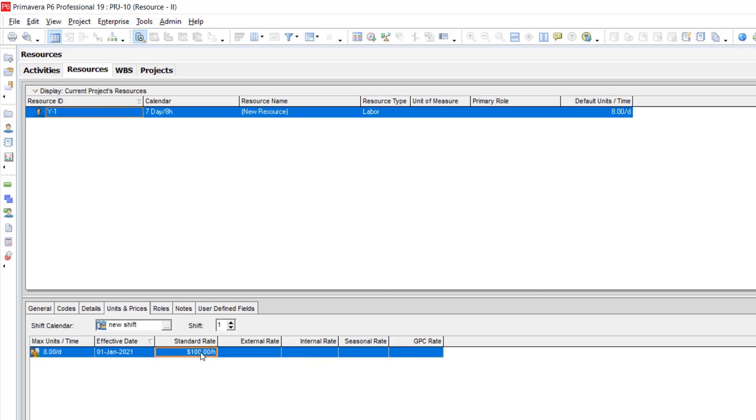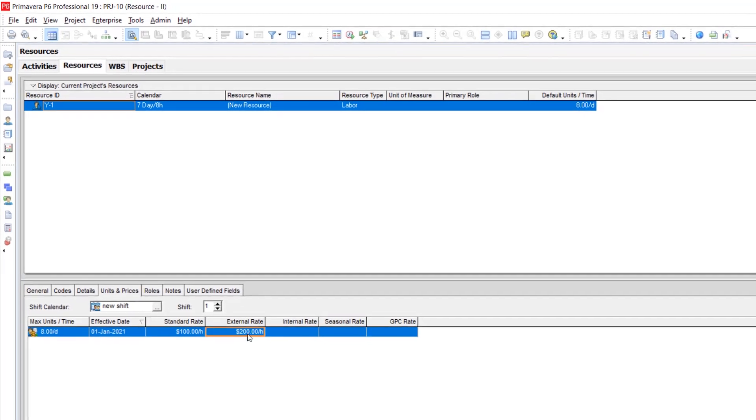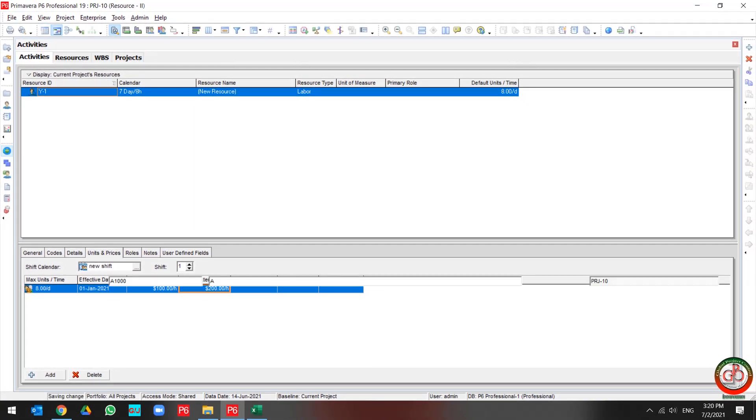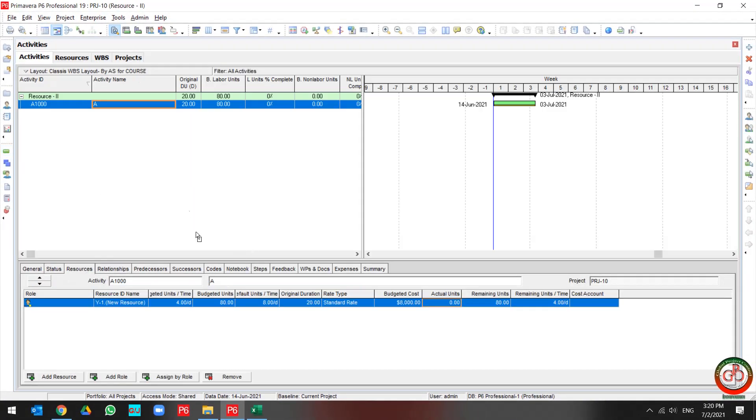Let me assign $100 for the standard rate and for external rate $200. So I come back to the project, and as you see, my price for this activity budget unit is $80. So my price is $100, my total budget cost is $8,000.